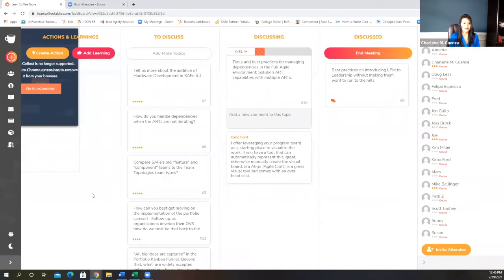Absolutely. I think when we go back to the Kanban systems, and if we think of a typical enterprise backlog structure, maybe a simple one for a portfolio SAFe, where we have epics that break down into features, that break down into stories, we definitely want to start making those dependencies visible early on. A typical exit criteria that you'd want to use in your portfolio Kanban is identifying very early, even before you have an epic approved, who is likely to take part in this value delivery, which trains are probably there.